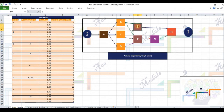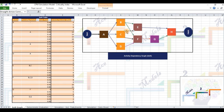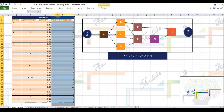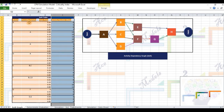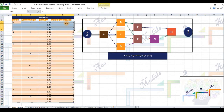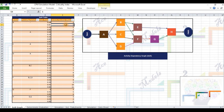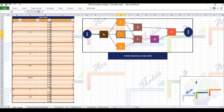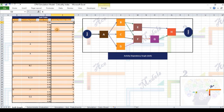Activity E has two predecessors in B and C. Thus, activity E can start only after the later of the end times of B and C has passed. In other words, activity E cannot start unless both B and C have ended. The last column of AON table lists out the range of closely related possible durations of each activity. For example, activity A can last for either four days at a minimum or five, six, or seven days at most. This implies that activities B, C and D can start only after either four, five, six or seven days have elapsed since the start of the project.